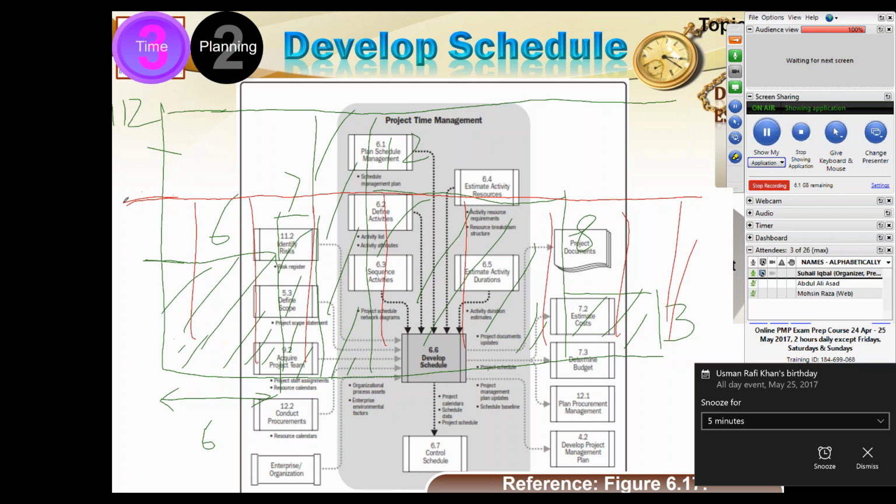If he is dedicatedly working on one activity, he can't be working on another activity at the same time. So, if this is the only resource I have, then probably only one activity will be done and the other will be delayed. As soon as he gets free from the first activity, only then he will be available on the next activity.